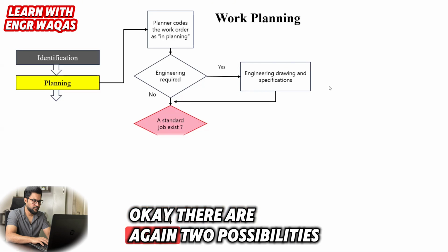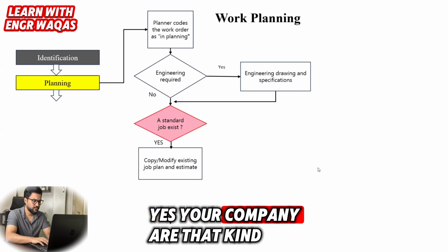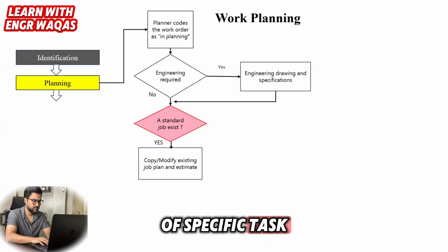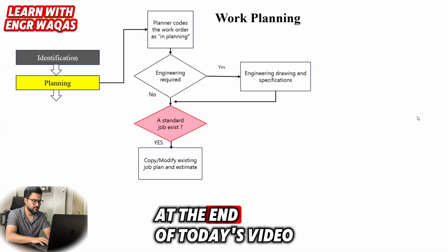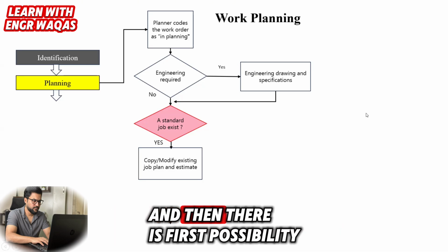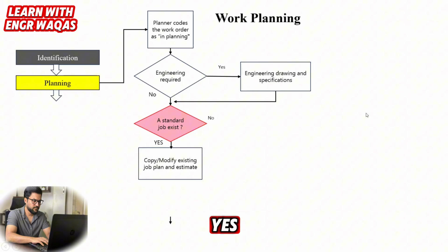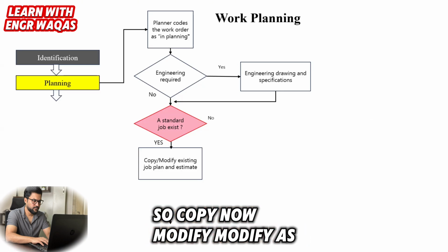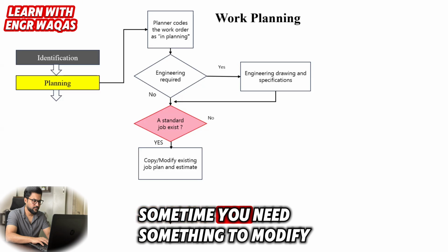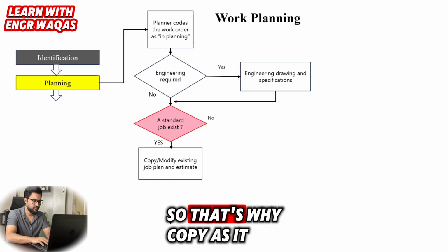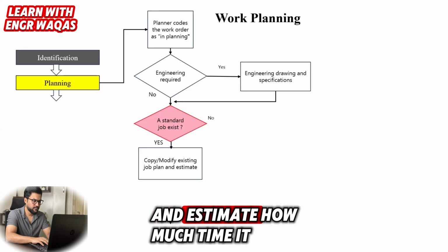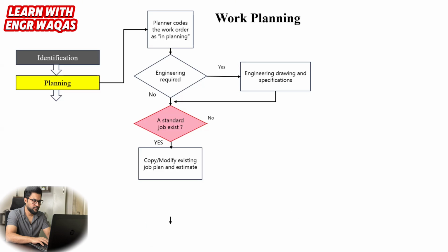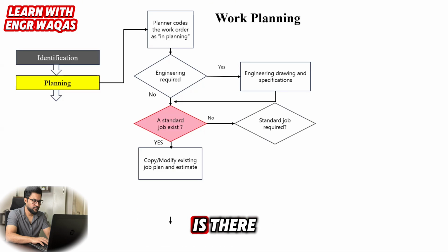Again, there are two possibilities. Yes, your company has that specific task and you have that standard job template. I will be sharing certain templates at the end of today's video. Then the first possibility is: yes, so copy it or modify it as per your requirement. Sometimes you need to modify something, so copy it as it is or make some amendments, and estimate how much time it will require to complete. Or there is another possibility: no, there is no standard job model.